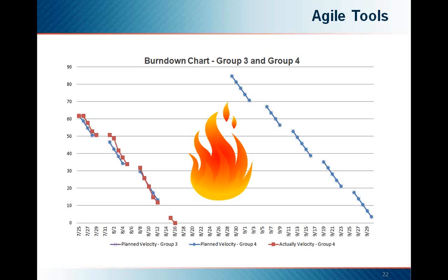So what's displayed here is actually an Agile burn-down chart from one of our projects. The chart is designed to keep the management and the team informed on the progress of the development effort. The total effort for the sprint is indicated in the Y column. Across the bottom is the time initially established for each sprint. As tasks are finished, we simply subtract the effort from the total and update the chart.